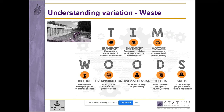There are a variety of tools and techniques for thinking about waste, a key one of which is TIM WOODS — absolutely no relation to me. As all processes will have a degree of waste, the TIM WOODS framework helps you think and systematically eliminate waste issues, which include: transportation — unnecessary movement of things, plant, equipment, machines and materials between processes or even sites; unnecessary inventory — work in progress, raw materials, extra copies of reports or tenders, things sitting about without having value added to them; unnecessary movement of people between processes or sites, perhaps taking the good guys off the end of a project before completion and moving them to the next project.